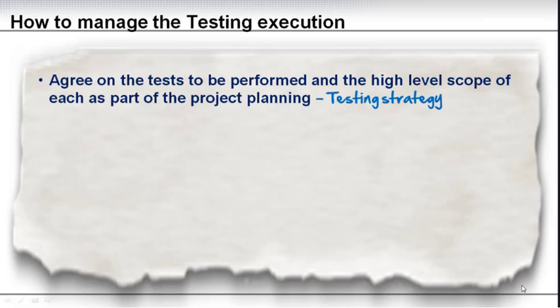If you're going down the road where you want the system and performance, the stress and performance test, you need to factor that in. If you want to test your authorizations during SIT or your integration test and unit test, you need to factor that in. So you need to make sure you agree in the project planning: what test am I going to do? So you can allocate the resources and the time early on.